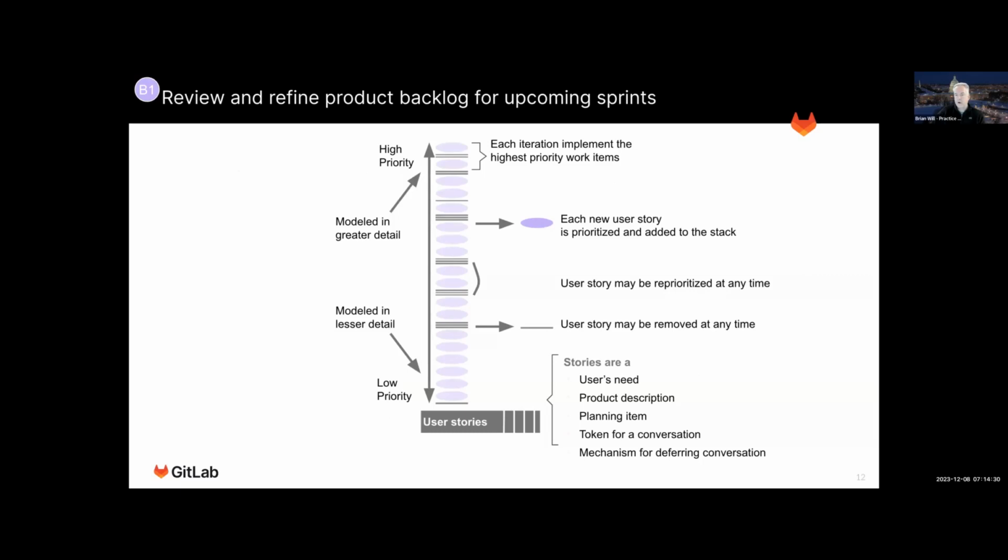The product backlog is really just a fancy to-do list of issues that you document. Once it's in the product backlog, usually things are assigned to a sprint or a milestone, so it can deliver against those. So it's a running list that, as you learn about implementation challenges, you add additional issues. You might figure out 4 or 6 weeks into a project that certain things aren't necessary any longer because the situation on the ground changed. So it's important to keep the product backlog up to date.